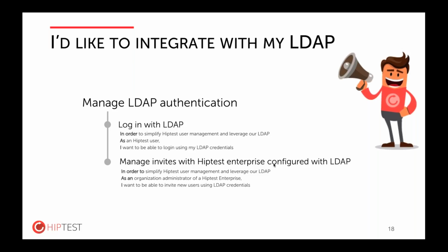If we don't have the discussions all together before starting the development, you can be sure that we will waste 2 weeks developing the wrong thing, and then we will have to check this with the customers and see what's the difference between what we've done and what the expectations were, and start the work again. In this case, based on the examples, before investing a penny in the development, we were able to share these examples with the customers and make sure that we were about to start developing the right thing.